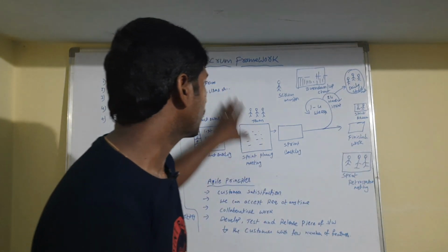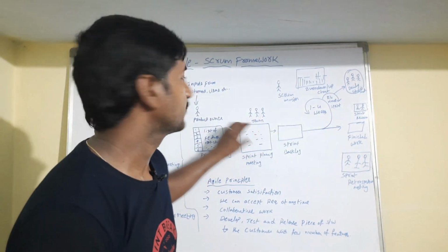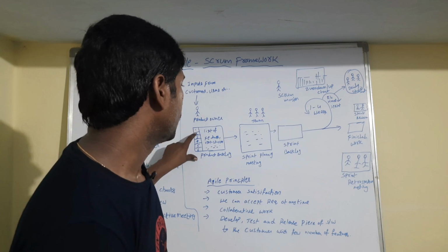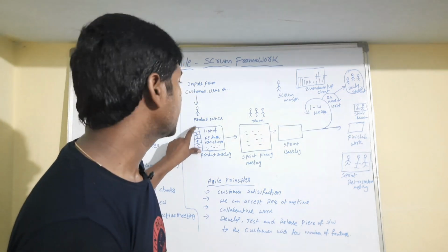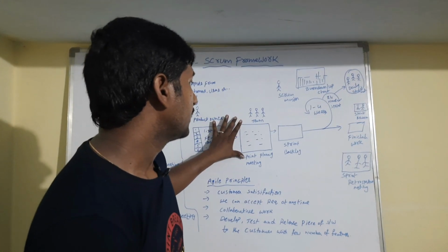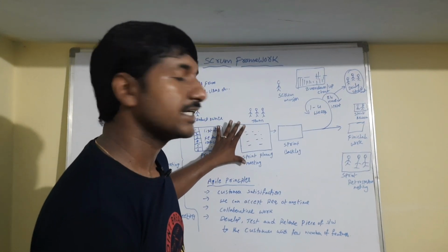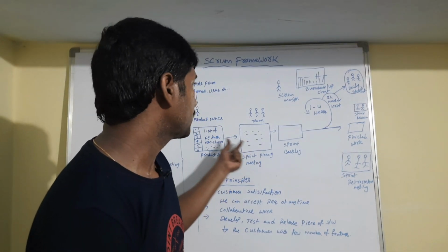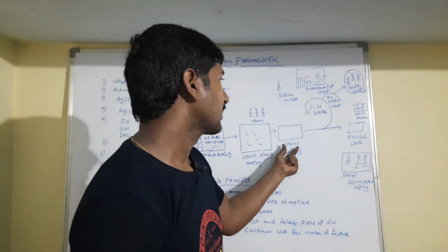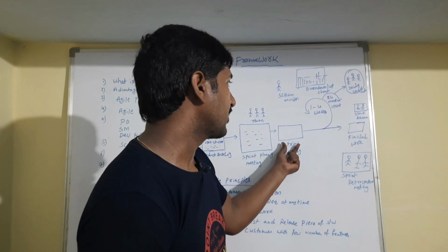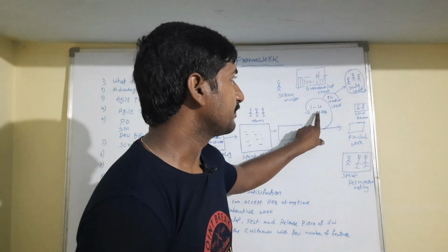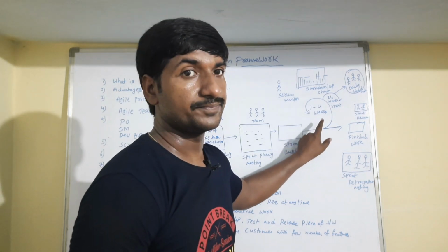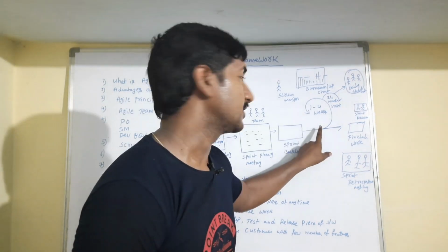Okay, so this is overall the Agile project process, guys. The product owner is responsible for taking the input, and he will prepare one product backlog, which contains a list of requirements. Then the team will conduct one sprint planning meeting. In the sprint planning meeting, they will choose the requirements from the list of features, and in the sprint backlog the committed requirements are available. Then the sprint runs 1 to 4 weeks; generally 2 to 3 weeks for every sprint in IT companies.